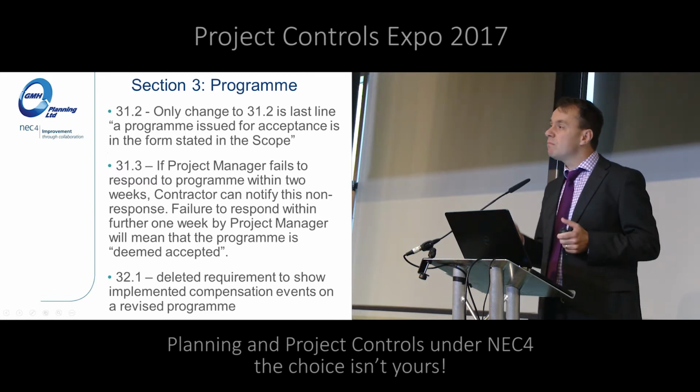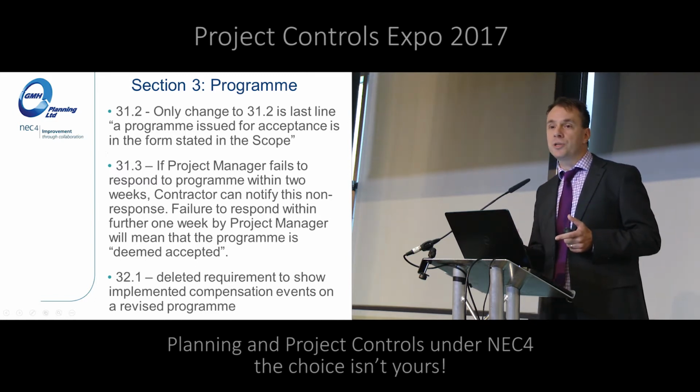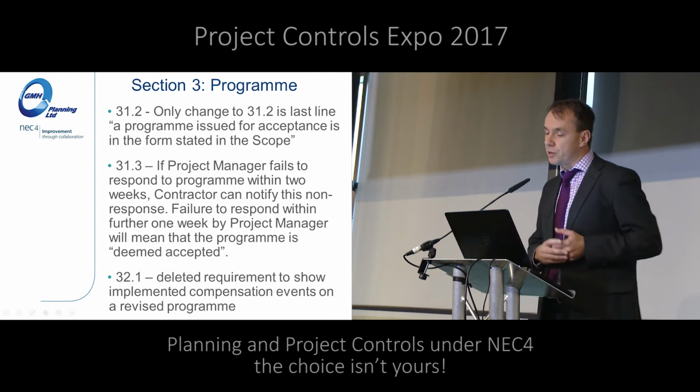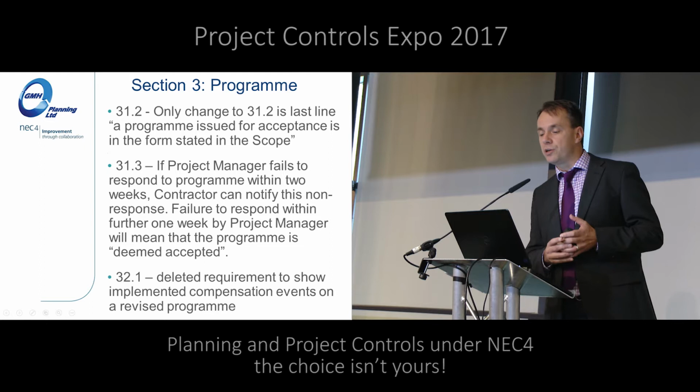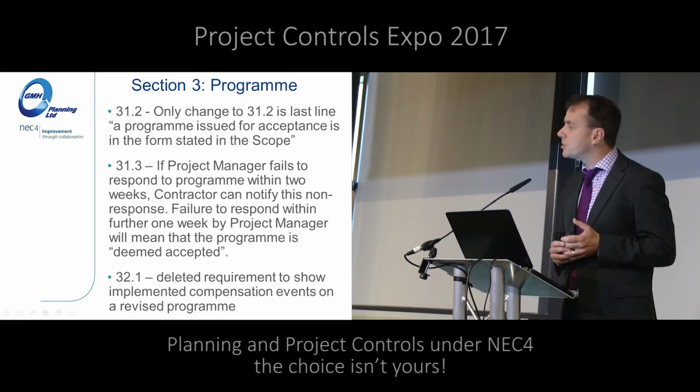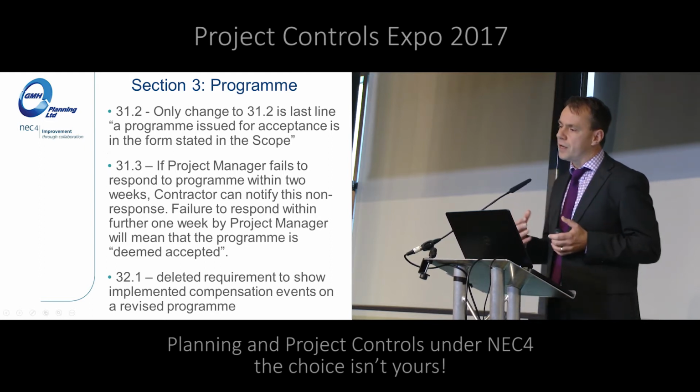In terms of programme, not too much change, certainly for 31.2. You'll be familiar with that big list of stuff you've got to include in a programme. The only real change to 31.2 is an extra line saying a programme issued for acceptance is in the form stated in the scope. So just a bit more of an indication there.